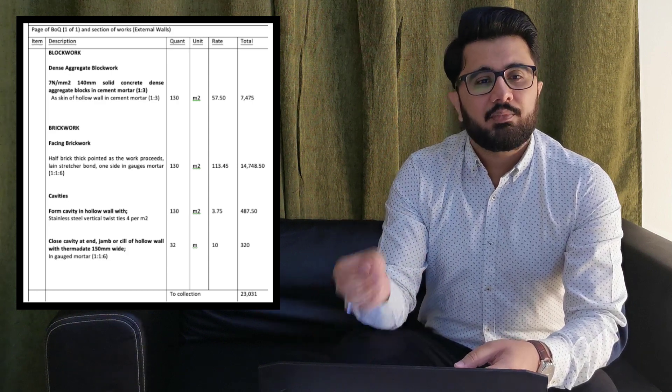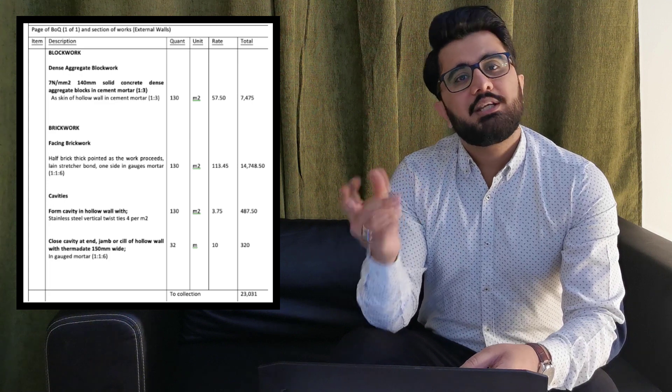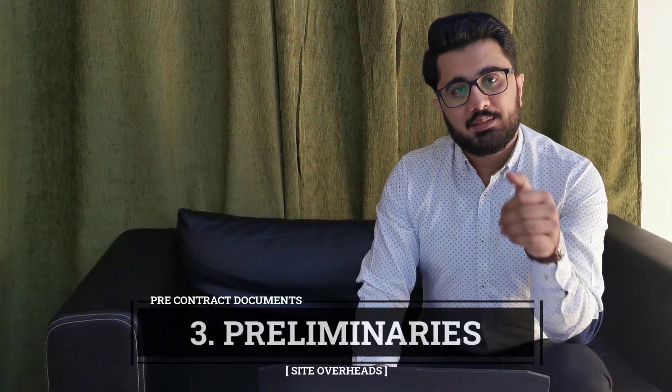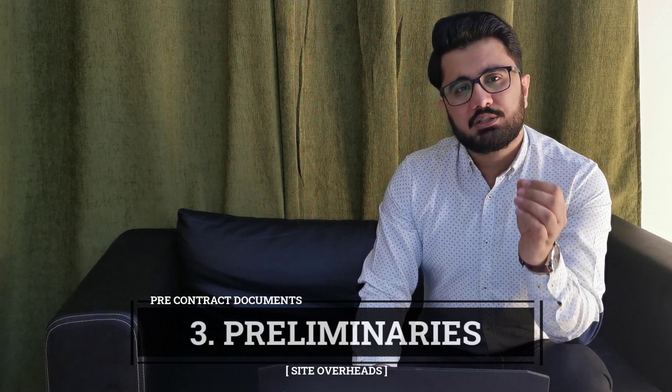The second document is the BOQ — the Bill of Quantities. This is the signature document of quantity surveyors, prepared according to the nature of the project by following standard rules. It includes listed items of work with their description, total quantities, unit rate per unit, and amount per item. The purpose of this document is to enable contractors to prepare tenders more efficiently and accurately.